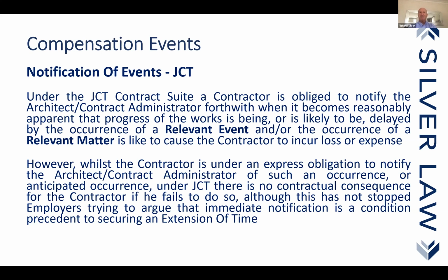So you issue an instruction. PM should also issue an early warning notice because it is likely that this compensation event, this instruction, will increase the total of the prices. There's likely to be a value. So you should be issuing an early warning notice. It's also likely or possibly to cause delay. You should be issuing an early warning notice.